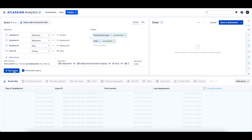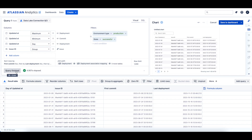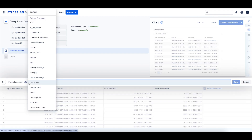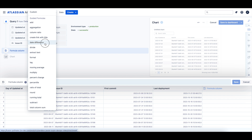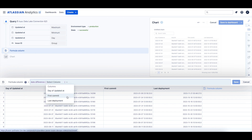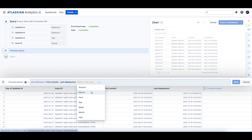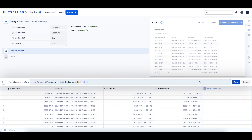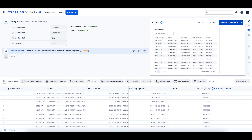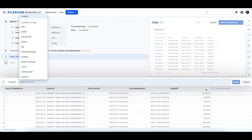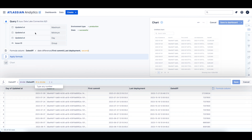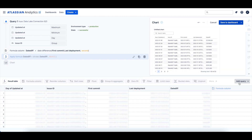Now we can run our query. To start calculating our deployment cycle time, let's add a formula column and use the date difference guided formula. We'll select the first commit column and then the last deployment column, and we'll choose second as our time unit. Next, we can apply a formula to the date diff column using the divide guided formula, and we will divide this column by 86,400 to turn the seconds into the number of days from the first commit to the last deployment date.